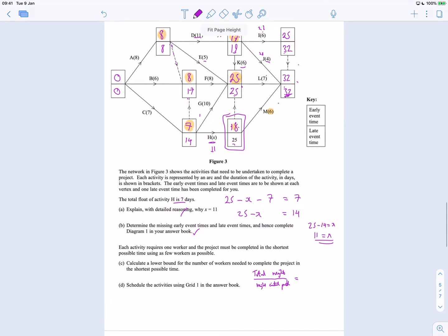The reason for that is because we're always going to have on our Gantt diagram one row that's our critical path, and then we can't create another row that would be longer, so we will just want to keep adding as many rows as possible that's either the critical length or shorter. We can't have a row longer than the critical path because then it's not critical anymore.